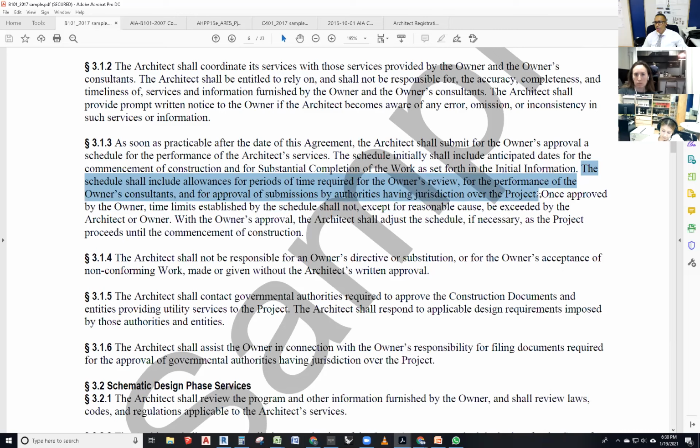So you've got to allow, at least in Massachusetts, 30 days for a building department to issue a permit. They could issue it in a week, they could issue it in a day, but you've got to allow 30 days for that. So if your project is going to begin construction in, let's say, March, your drawings should have already been submitted at least a month, or almost a month and a half, prior to that, so that you allow for trouble, for questions from the building department and things like that.